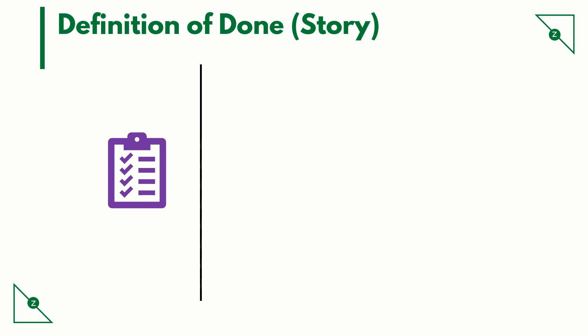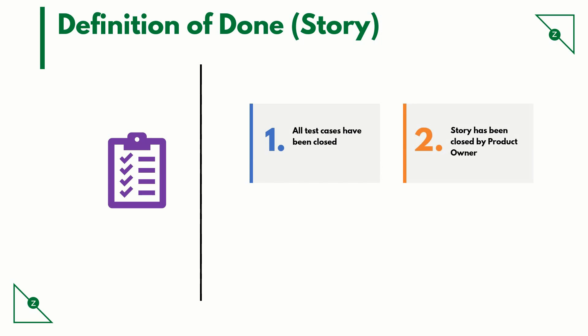Here are some pointers for definition of done for a story. All test cases have been closed. The story has been closed by the product owner. No open bugs in the story — as discussed earlier, the buckets can be predefined.